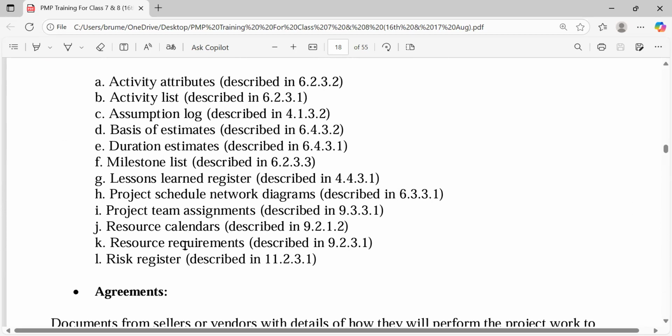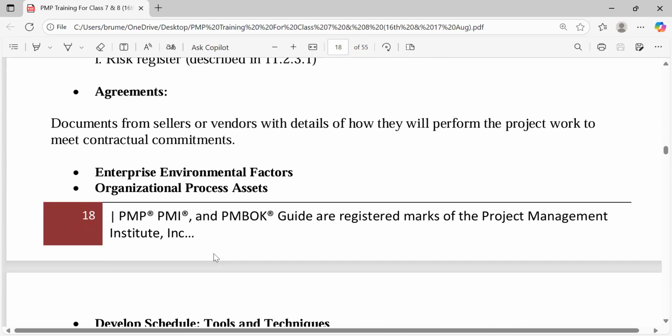There is no way you would continue scheduling your project without citing the risk register. The risk register will show you the likelihood of events occurring, unwanted events occurring, unplanned events occurring. And if they may occur, what impact will they have on our project or activities? Risk is probability times impact. When we get to risk management, more will be shared.